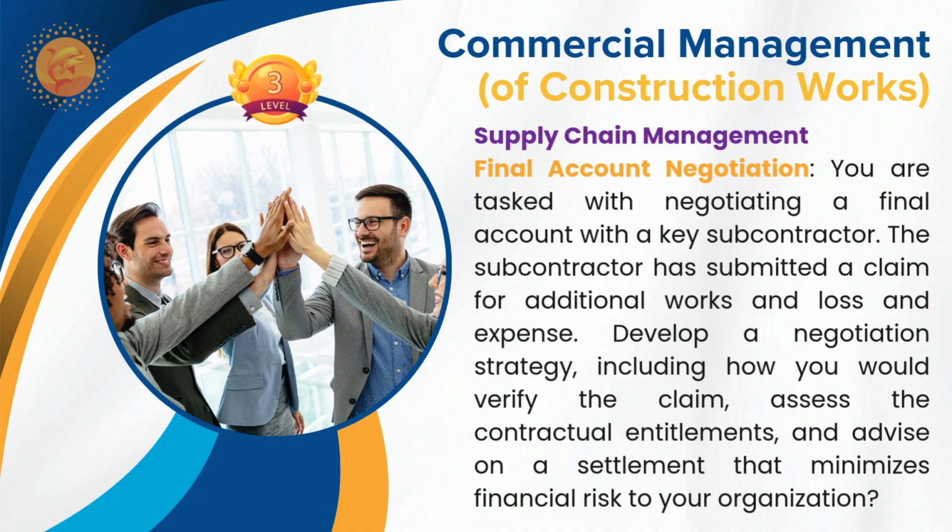That is one scenario. If it is not going to be that, this subcontractor is clearly a domestic subcontractor and you have to tackle him based on his subcontract, which is irrelevant to your main contract. Then you have to do all the verification for their contractual entitlement and also assess their claims and loss and expense claim for additional works: what is their entitlement, and who is responsible for that additional cost.